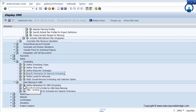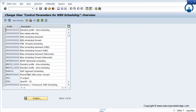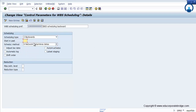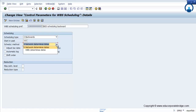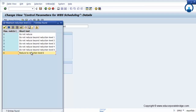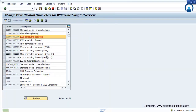Similarly, define the parameters for WBS — like network scheduling, there is WBS scheduling. You have to define parameters for WBS: whether backward or forward scheduling is required, how many days past you require. The scheduling determines dates — whether it is a network or activity. Address basic dates, automatic log, automatic scheduling, and maximum reduction level — you can maintain all of these.